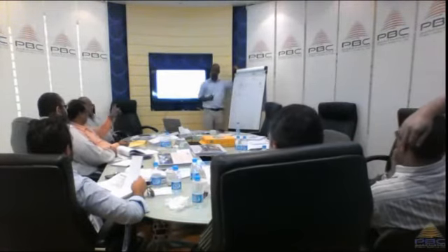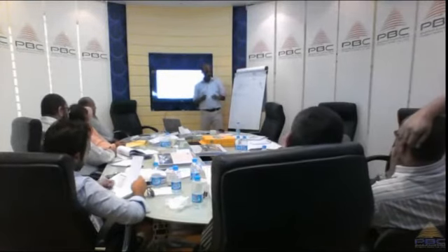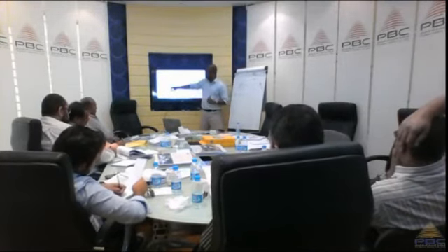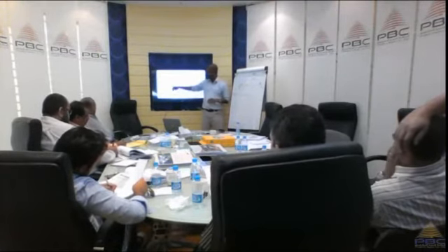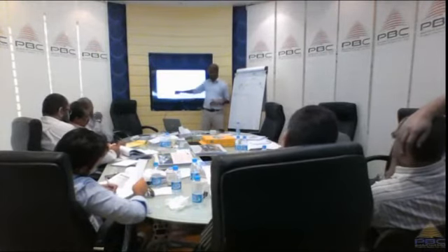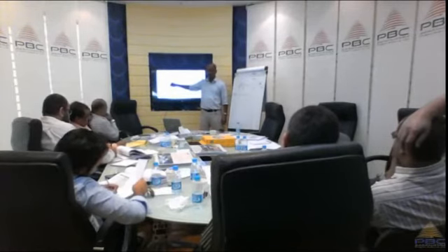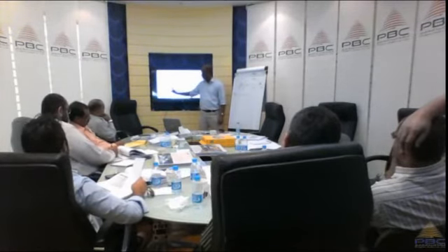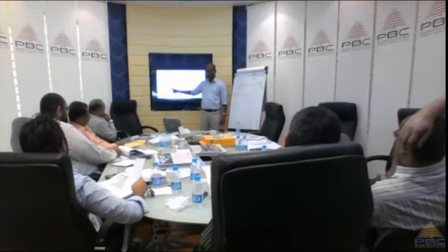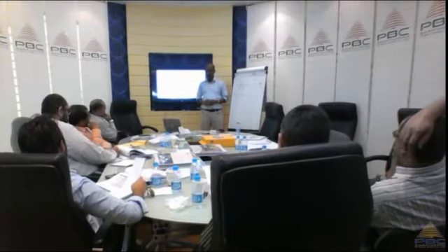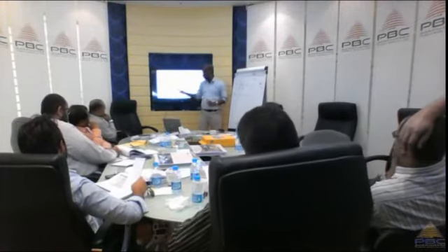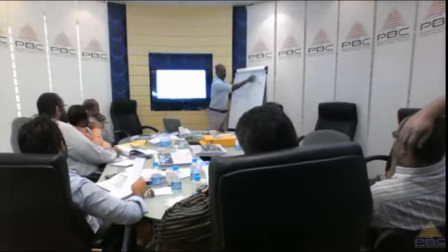Now, if you have some trust in the project manager's calculation, instead of ETC, you still have AC here, but you add to it the difference between the BAC and the EV. So you take away earned value from the BAC and add it to AC to get a new revised BAC.